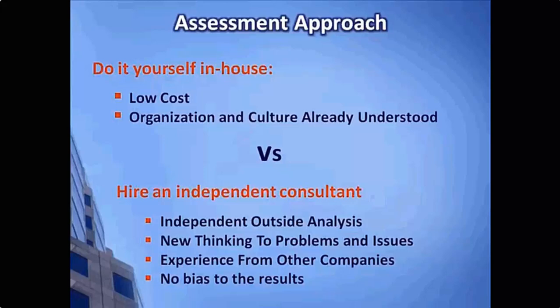The disadvantages of trying to do an assessment on your own or in-house are many. Experience has shown that there's a very strong tendency to do these with biased attitudes and answers. Worse, it propagates a narrow mindset, since the people doing the assessment are probably the same people who already manage and run IT. There really is a lot to be gained by using a good outside party with the right skills and experience, even if the ITIL implementation effort doesn't move any farther forward. If done right, you will see a lot of interesting results and it really helps you identify where you sit today.